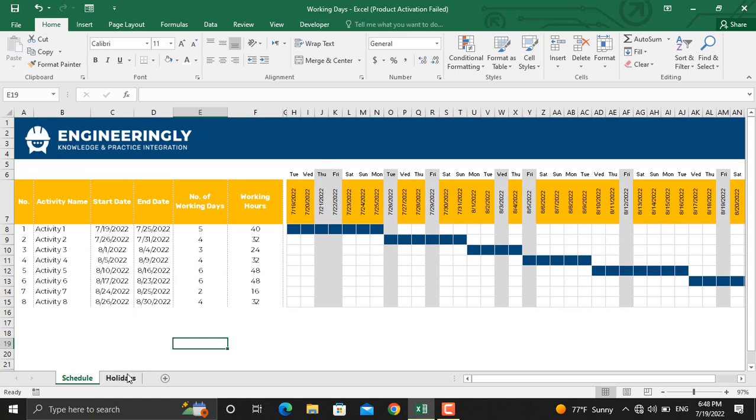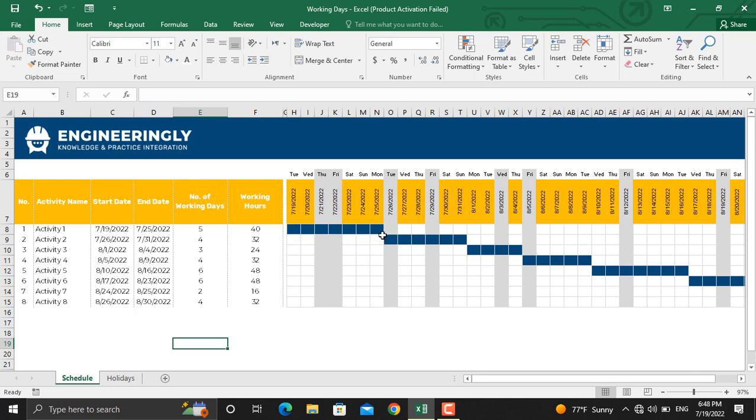The two days which are Thursday, which is a holiday in here, and the Friday are non-working days, so they are excluded from the project's working time. And as you can see the Gantt chart in here, we have two days off and two working days before the holiday, and three working days after the weekend. I assumed Friday is the weekend for this project schedule. Same applies for the other activities.